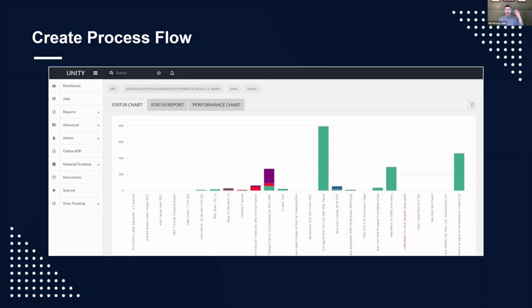Then she has it on her board saying, here's an M1 you need to work on. And then Ku's team will scan, let's pretend this was 3,000 rolls or something. Assuming it's one document type, so they're all the same type of microfilm, he'll take maybe 5 or 10 rolls and say, we'll scan these, and project manager, use these to create the process flow. So we'll scan them, and she'll create these steps based on this. And then they'll run that through the entire process to make sure each step works and that the deliverable is actually what you as the client want.